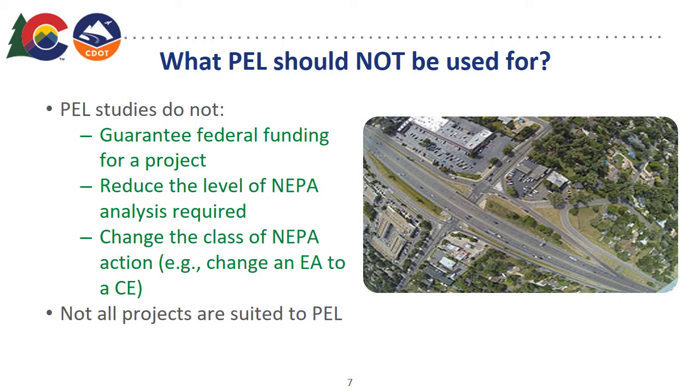A PEL study does not guarantee funding and should not be conducted with the primary purpose of positioning for federal funding. A PEL study does not reduce the level of analysis required for decision-making under NEPA, and PEL studies should not be conducted with the intent of minimizing or shortcutting NEPA requirements or of downgrading a NEPA class of action. However, PEL studies can help streamline the NEPA process, as mentioned, by incorporating relevant analysis and public and agency input, and by identifying where to hone in on and do more focused analysis in NEPA. But not all projects are suited to PEL.